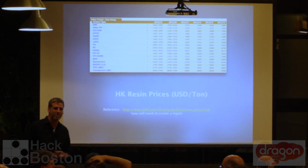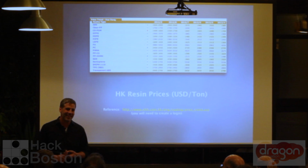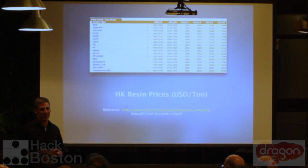If you do hard tooling but you don't wear it out and then end up ramping up with another factory, do you ever have an issue getting the tooling moved from one factory to another? Oh, absolutely. In theory, it seems like it should be easy to move, but the first factory is not going to want to give up the business, and probably the relationship has deteriorated, so it's going to be really difficult. I always assume we're just going to have to make new tools. It is possible to move it, but then the new factory is probably going to have trouble running it for whatever reason.